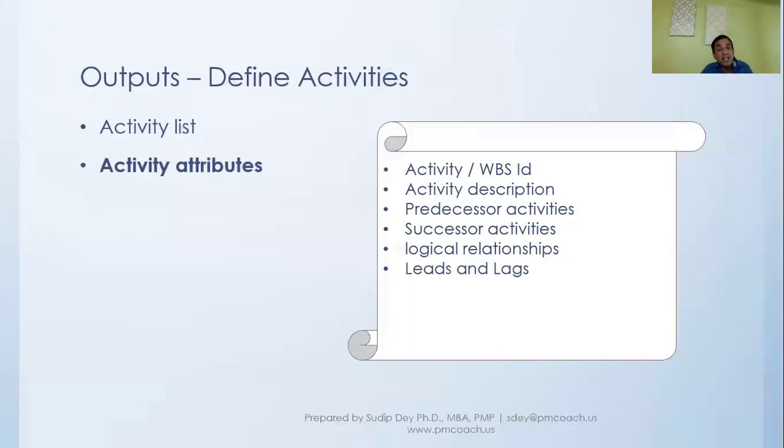And then, is there any lead and lag? For example, if I'm saying that this particular activity has to start only after the predecessor activity has finished, does it mean that I can start this immediately after the predecessor is finished? Or do I have to wait for some time, which is the lag? So we'll talk about this a little more.